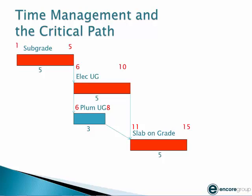Now, what the scheduling software will do is start with the very last activity — or any activity that does not have a successor — and begin counting backwards from 15. If that activity is going to finish on 15, then it has to start on day 11. If it's going to start on day 11, then those previous two activities both have to finish by day 10. If the electrical is going to finish by day 10, it will have to start on day six. The plumber, if it's going to finish on day 10, will have to start on day eight. The subgrade will have to finish on day five and start on day one. The computer then takes the difference between either the start or finish: the slab on grade has zero float, the electrician has zero float, the plumber has two days of float, and the subgrade has zero days of float.